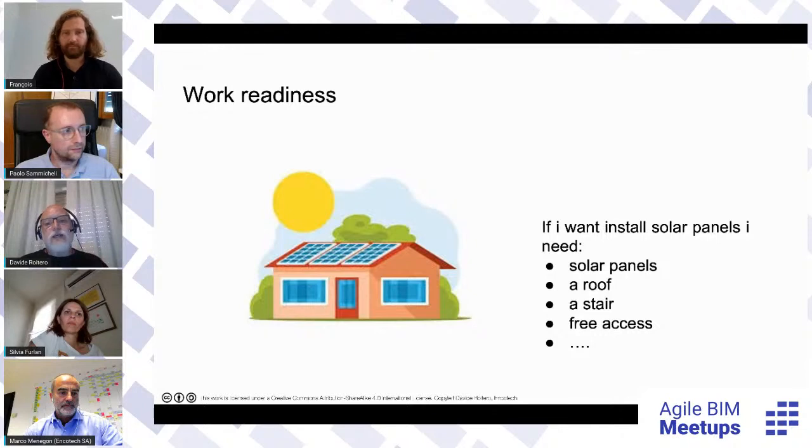This was another important awareness that the product owners reached. If you want the team to work on a story, you have to get it ready. Otherwise, it will just be a big waste of time. Only a big waste of time.